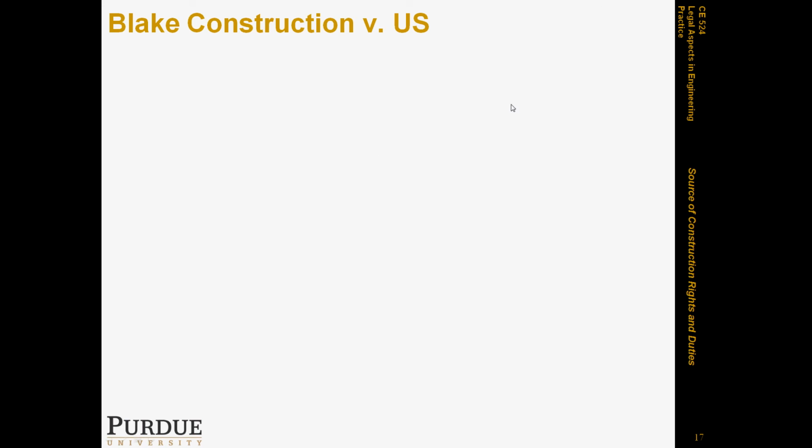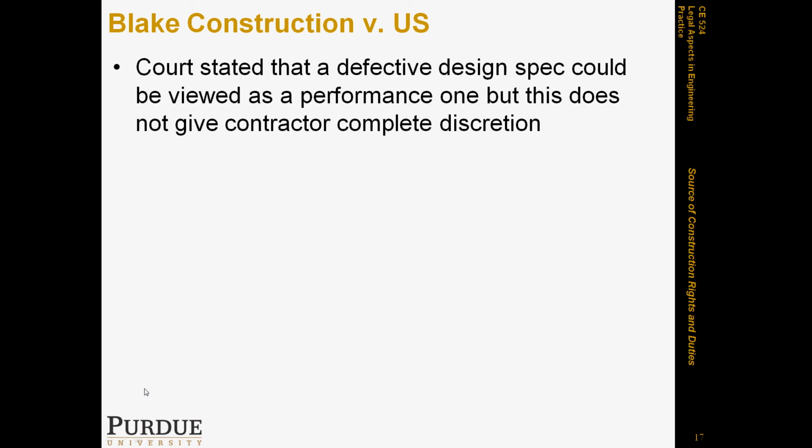So the court said that although this design specification was defective, you can actually view it as a performance specification, but it does not give the contractor full discretion.